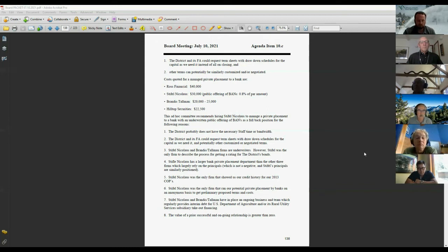So what we instructed the agents to look into is a final maturity date of November 2025 to allow for 1 year of potential delays to the project, but also allow us to call it earlier to reduce the cost of the financing. So the process we went through to do this was we have some history.